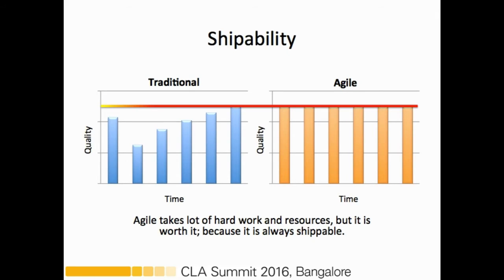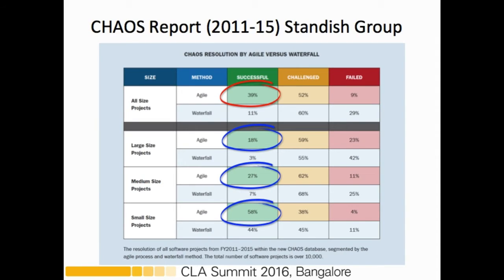Comparing the traditional and agile methods: agile takes a lot of hard work and resources, but it is worth it because the project is always shippable. Looking at the Chaos Report published by the Standish Group annually, comparing data from 10,000 projects over the last five years, you can see that the agile method has been relatively better than the waterfall method.